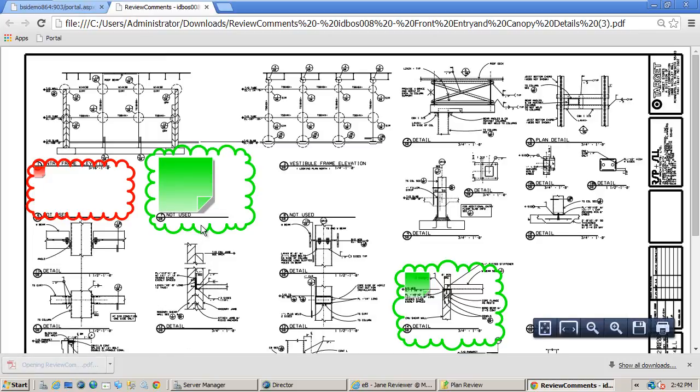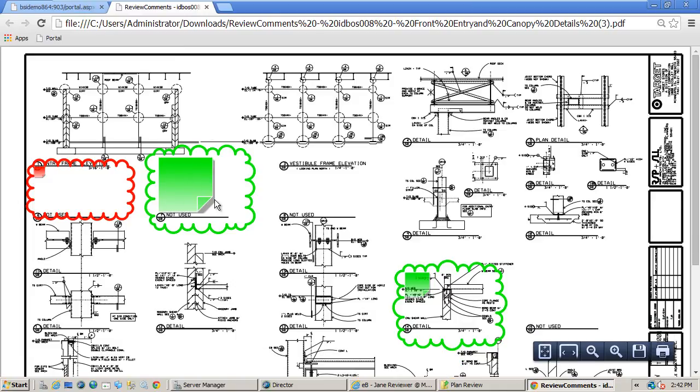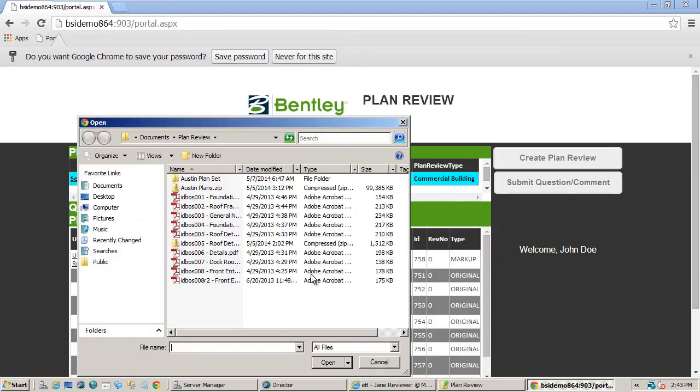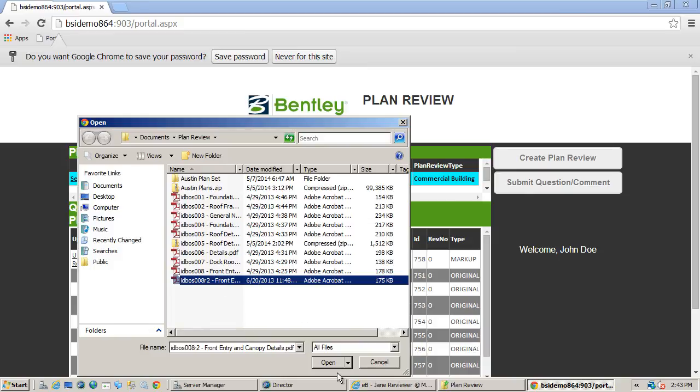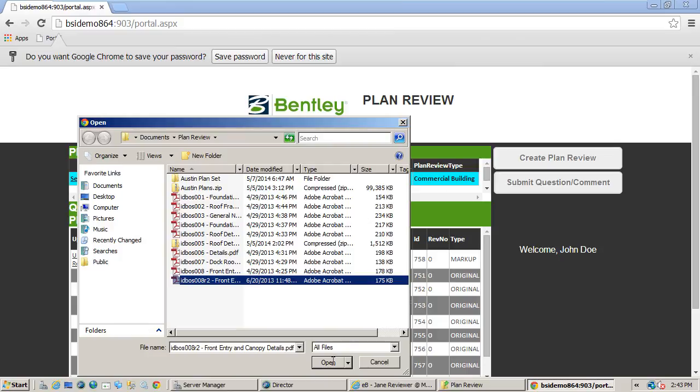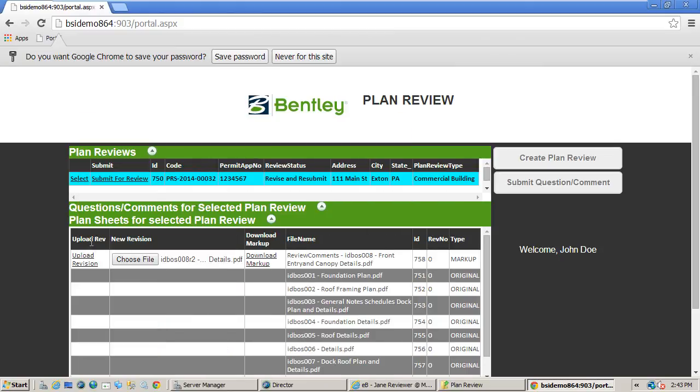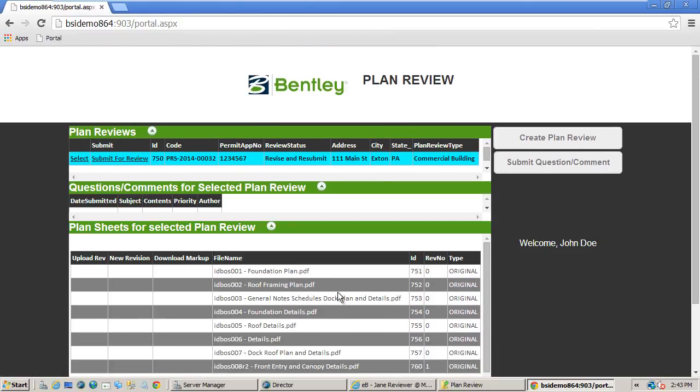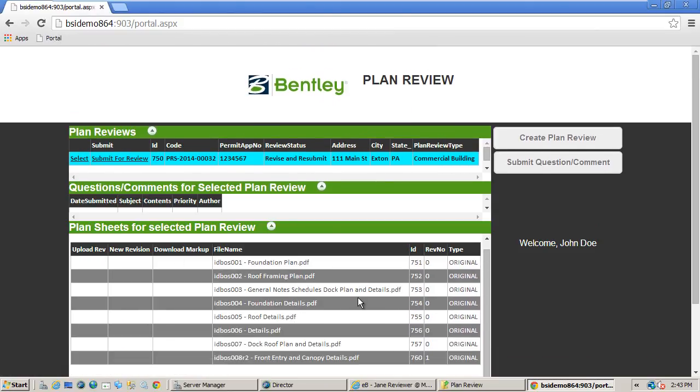And I can download the markup that was published by the internal reviewer. Once the submitter reviews the markups, they can then submit a corresponding file back through the upload control. This function leverages the version control capabilities of EB Information Manager. Creates a new version of the file rather than complete replacing it. Here you can see the rev number has changed for that plan. Now the submitter can resubmit the file for review and run it back through the process.